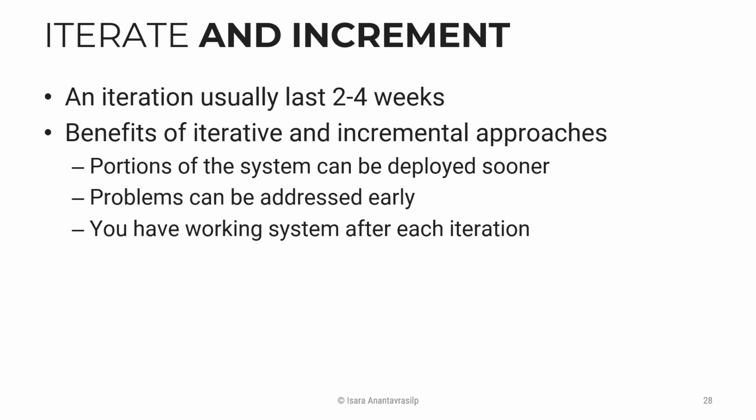The benefits of the iterative and incremental approaches are that a portion of software can be deployed to the customer sooner, and because the customer sees the software sooner, the problems can also be detected and addressed early as well. And apart from that, after each iteration, you have a working system, so the customer knows the progress, and you yourself, the development team, also feel better. Hey, we have achieved something this iteration. We have done something this iteration.